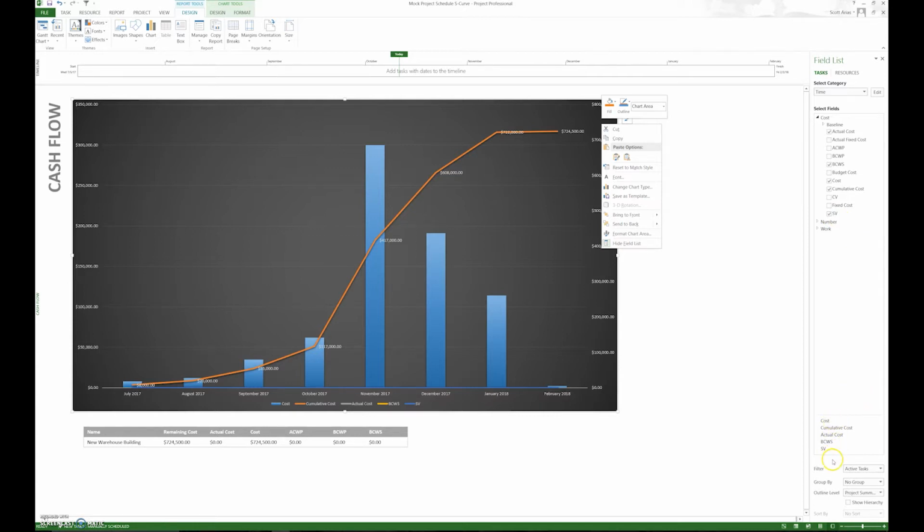So these are the columns that are shown in this graph, and it'll show you every individual period how many costs we're incurring: 8,000 in July, 20,000 in August, and 55,000 in September. So the line, the S curve, the actual cash flow curve, shows us how many costs we're incurring each individual period. If I want to see how many costs I've incurred to date, I can say, okay, 8 plus 20 is 28,000. So it doesn't mean that this period makes $12,000, and we're at 20,000 at the end of August.